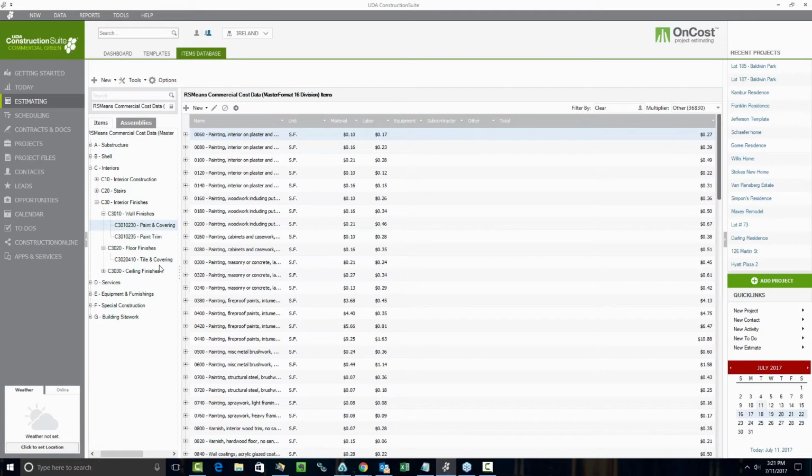So use this to include the full package, and that way you can kind of price check the people that you work with. This is a beautiful tool for that, and you can always just kind of use this as a negotiation. The national average might be XYZ. The guy is overbidding that by 25%. You know that he does a great job, so he's worth a little extra, but maybe you can pull him back down a little bit from there. So again, this is going to provide you with the pricing details if you use it.